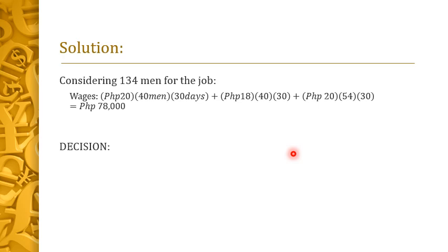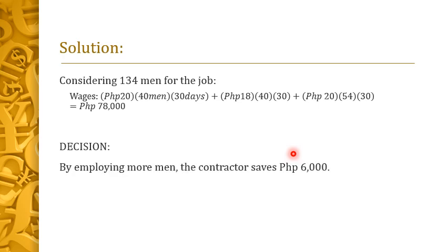Now, what is our decision? Should we employ more men for the job or not? By employing more men, the contractor saves 6,000 pesos. Therefore, we should employ 54 more men for the job because we can save 6,000 pesos if we do so.